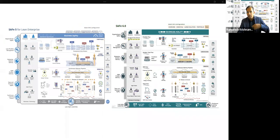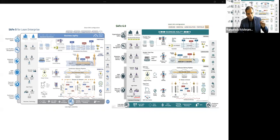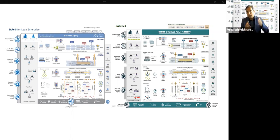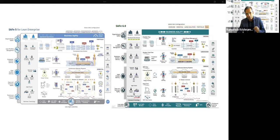Now let's talk about roles and responsibilities. Starting at the team level — in the previous version, the roles were product owner, scrum master, and the teams who do the work. In 6.0 these roles remain the same, but they have also added the term team coach alongside scrum master. The reason is that not every team follows Scrum — some follow Kanban or other practices. Teams following Scrum will have scrum masters, while teams following Kanban or other practices will have team coaches. That is one of the key role changes in 6.0.